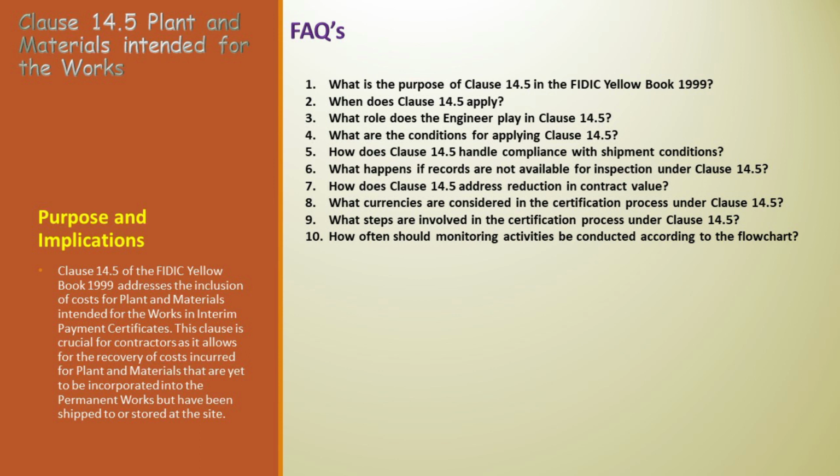8. What currencies are considered in the certification process? Answer. The currencies for the certified additional amount should match those stipulated for payment when the contract value is included under subclause 14.3a. 9. What steps are involved in the certification process?